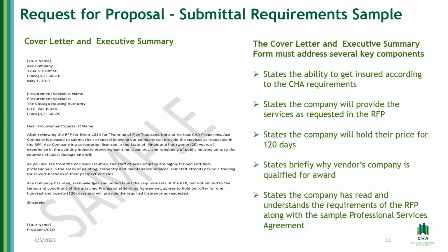It states the company will hold their price for 120 days, which means this offer is good for at least 120 days. It states briefly why the vendor's company is qualified for award, and also that the company has read and understood the requirements of the RFP along with the simple professional service agreement.